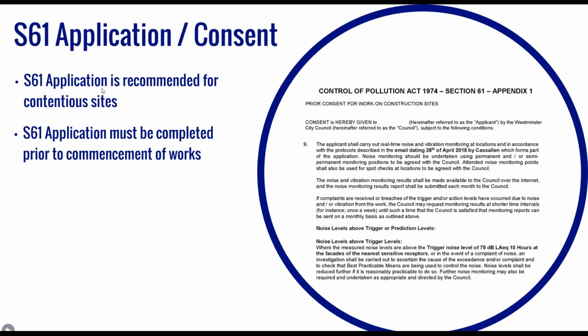This includes carrying out real-time monitoring as per the acoustician's recommendations, that noise monitoring should be carried out at permanent and semi-permanent locations and include attended measurements as spot checks where required, that the results of the monitoring should be made available to the local authority over the internet, and that the results should be submitted to the local authority every month, and that in the event of complaints or breaches of the agreed trigger or action levels, the local authority might request results at shorter time intervals.